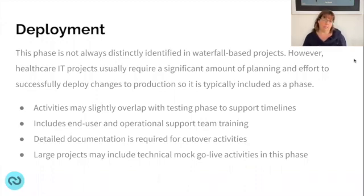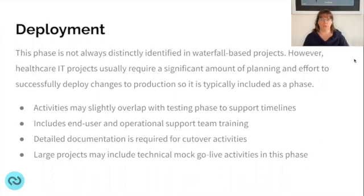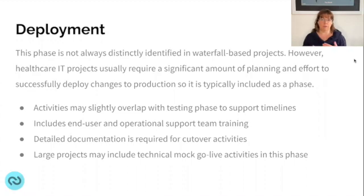The deployment phase in health IT waterfall includes operational and support team training. You need very detailed documentation on what will happen during cutover — covering both the technical and application side as well as the business side. Especially in a hospital running 24/7, you need to understand when cutover activities or downtime occurs: what users do leading up to it, during the deployment, and immediately after for reconciliation. All of this needs to be documented and communicated.